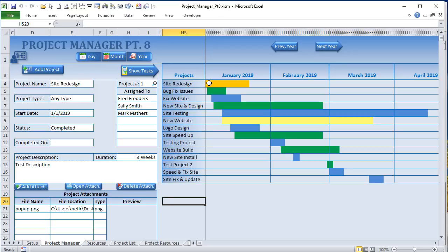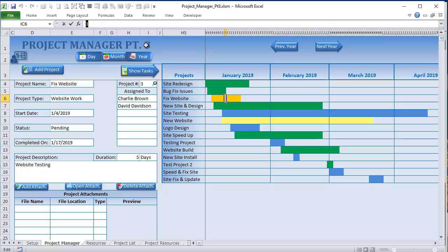All right, now what I want to do is, for every selected job, I want to color it orange automatically. Now how do we know? Now remember, if you recall correctly, every cell we select in that job has the job number here, 3. So what happens when this job number matches this job number? When those match, when the job number in here, or project number in here, matches the project number here, then I want to color that cell orange. It's a very easy conditional formatting. Let's see how we did that.